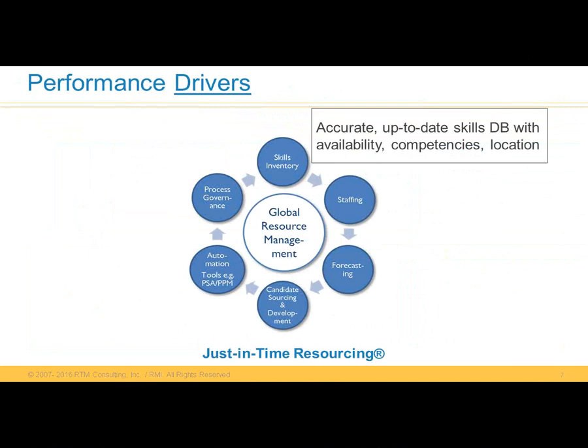On the skills side, a fundamental building block is getting an accurate skills database put in place. Hopefully that's in some kind of automation tool like a PSA or PPM tool, but having a database that says who do I have, where are they located, what competencies they have, what's their availability is really important, because that's the database upon which we draw when we start to look at our future forecasts and start to match demand to our supply of human capital. If that database is up to date, we're in a much better position to do that. If we're not, we're going to have a problem. So ask yourself, do I have that?